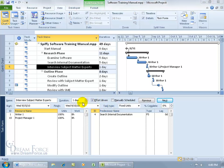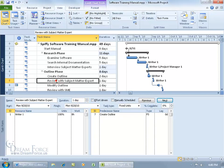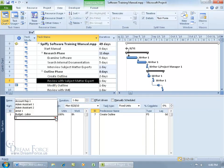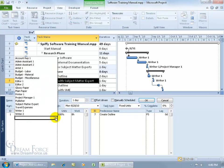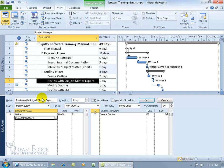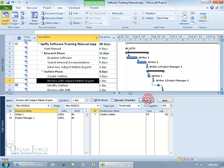Okay, should we do it again to compare and contrast? Let's go to task 8 and let's assign the project manager to it, coming down here and clicking on the arrow, project manager 1. Now if I did effort driven, they would be 4 hours each because 8 hours for one day. If I don't check it and I click OK, it doesn't do anything. So now we've got 16 hours in one day, so you can see the benefit of using effort driven.